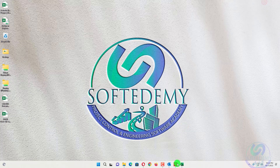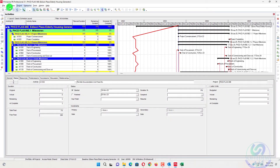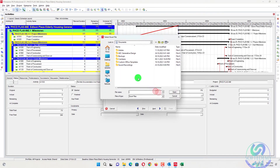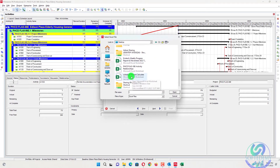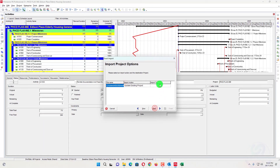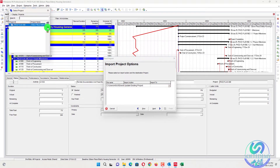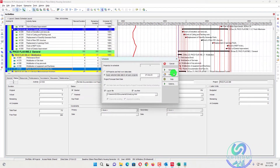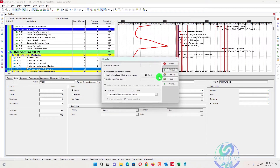Minimize the file and go back to Primavera P6. Import the file as XLSX, go next, select it from the desktop, choose activity relationship, select update existing, and choose the project you want to update. Click next, then finish.